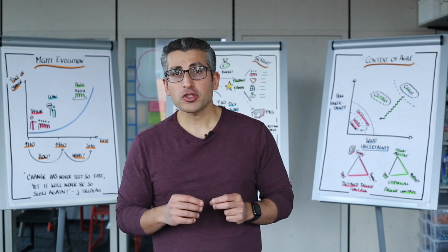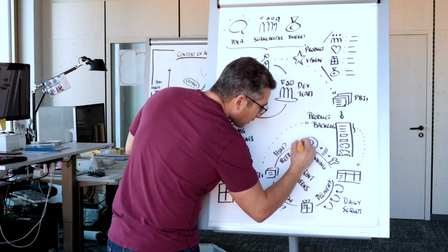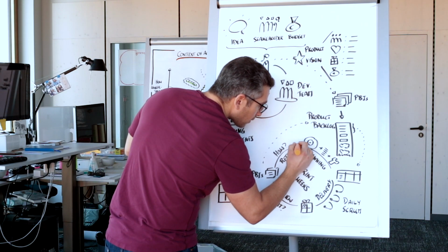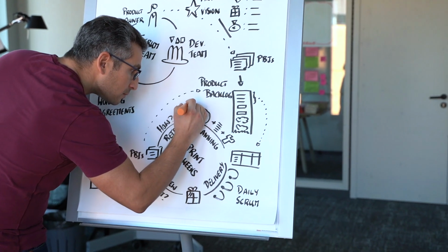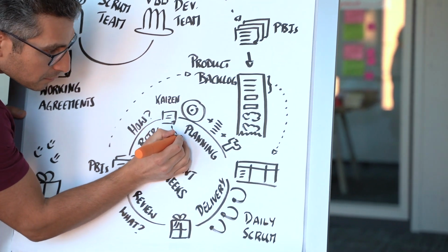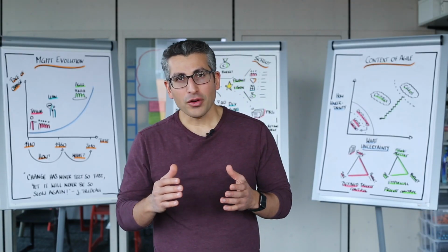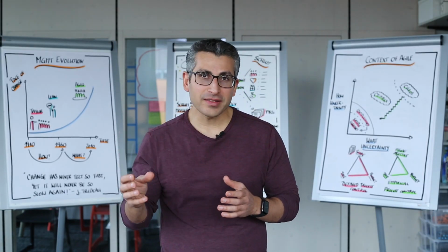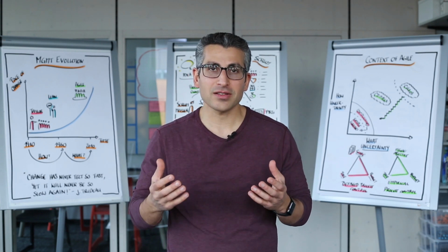The outcome of a retrospective is a clear action item of what we want to do differently in our next sprint. As the Japanese refer to it in the lean way of working, we refer to this item as a Kaizen. Kaizen stands for good change. We could also say improvement. Now, you see that after planning, the dailies, the review, and the retrospective, we get back to the next planning event.